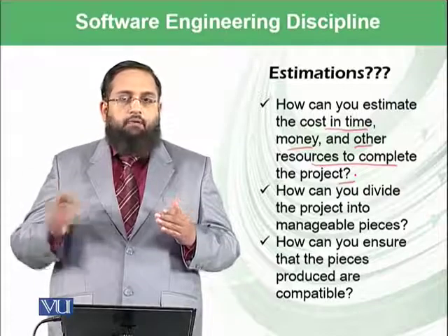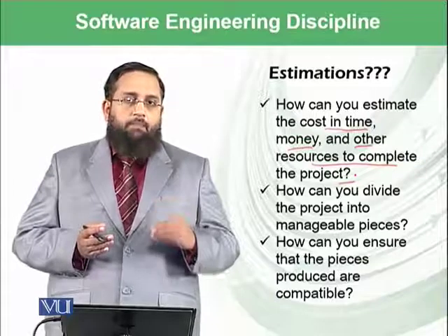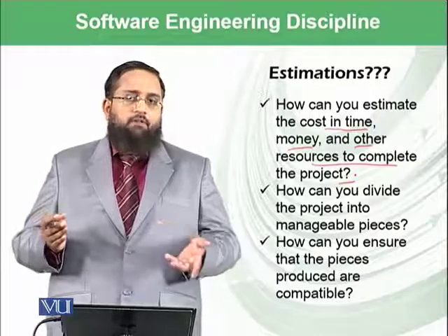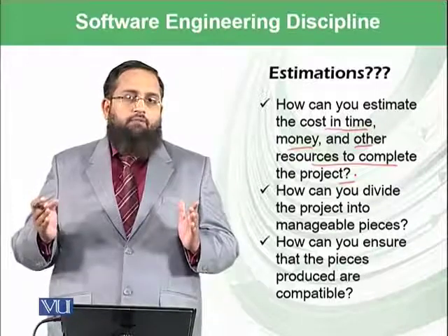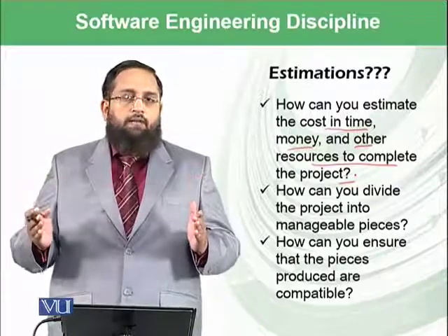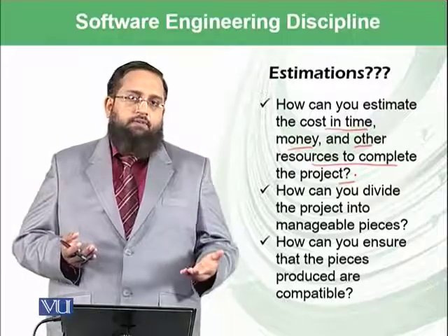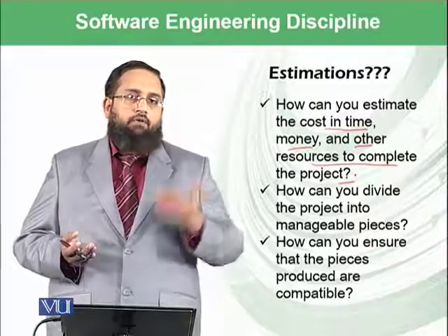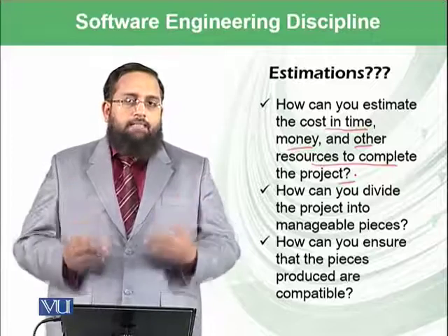For example, if you have done 100 projects, you cannot simply apply the knowledge of those 100 projects and say, okay, roughly on average I used to take 1 year to complete a project, so I estimate that I will need 1 year for this project as well, which is now being offered to you. This may take more than 1 year or it may take less than 1 year.